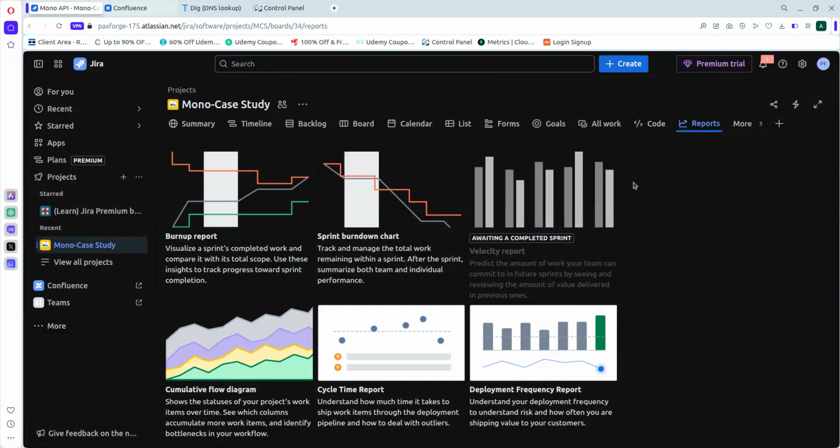So the essence of that velocity report is to help us keep track of how far we can go to speed up what we have on the ground. The way it would show up is with bars, as you can see in the image here, showing committed versus completed story points across all the sprints. So why do we need this? We want to use the bar chart as a reality check: are we really going to be able to finish on time?